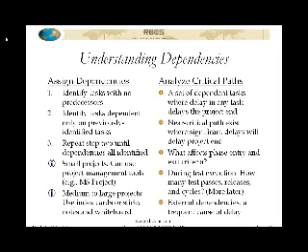Because one of the things that we're still missing is dependencies. There's got to be some set of dependencies that exist between the tasks, right? You do this before you can do this, before you can do this. In project management terminology, we would talk about predecessor and successor tasks. The predecessor task is the task that has to be done before the successor task can start.